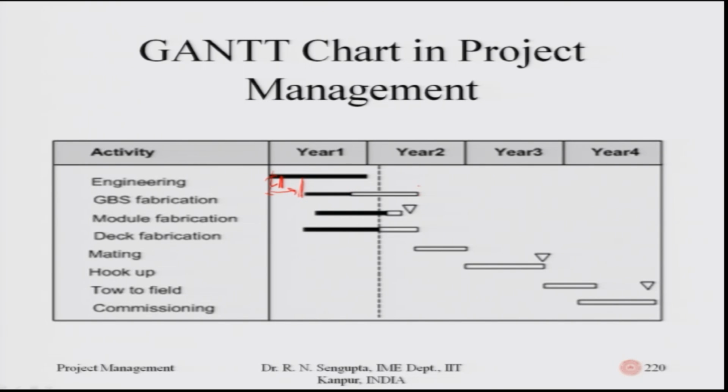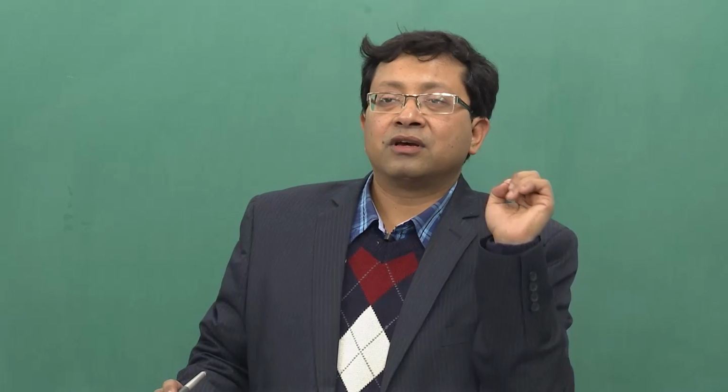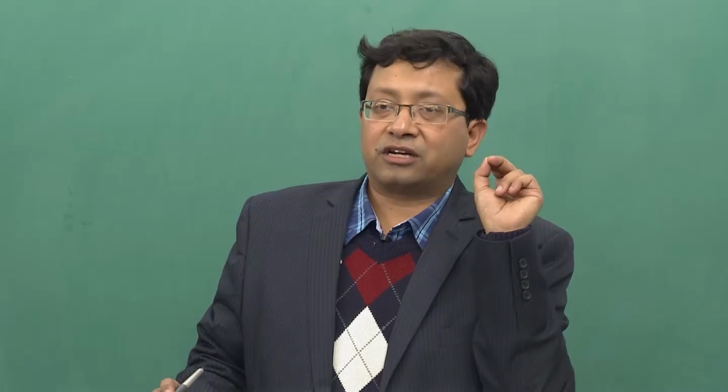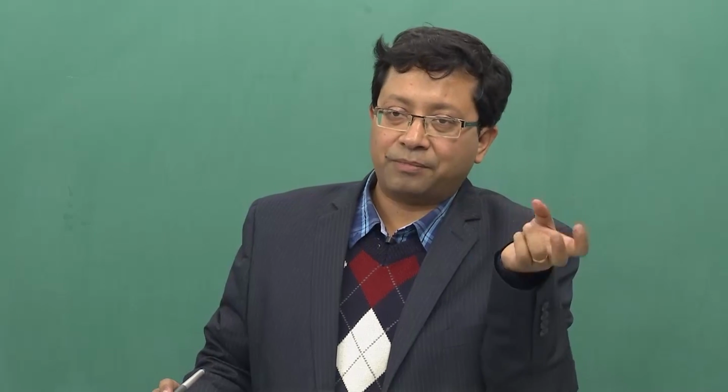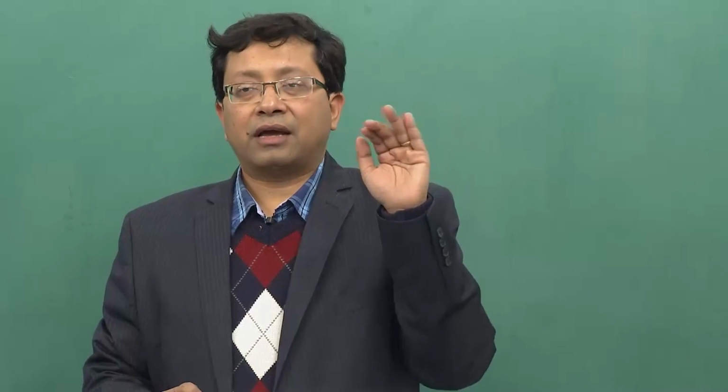matches exactly this end on this point, depending on if there is some resource constraints in the overall working of the fabrication part. Consider machines do not arrive, consider if there is a resource constraint of some material, consider technicians are not available, consider welding person is not available. So, if those happen, you have to consider that they can be shifted in such a way that those slacks can be utilized in order to cushion such that the overall time of the project is not exceeded.